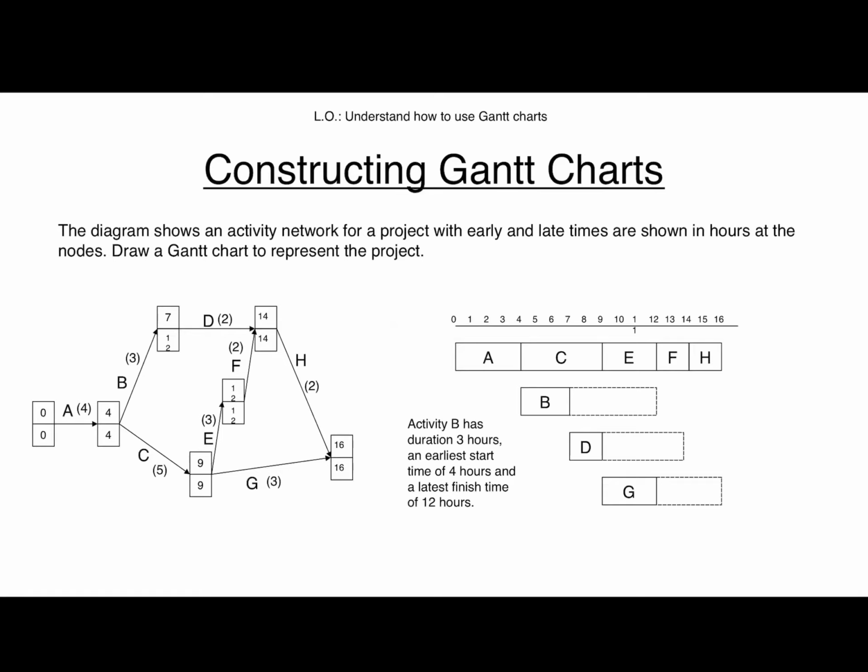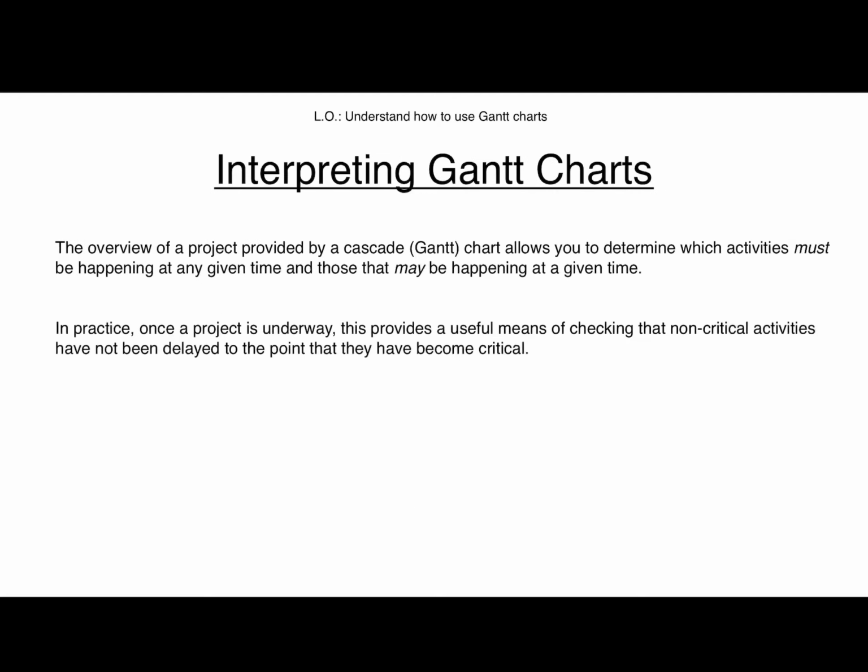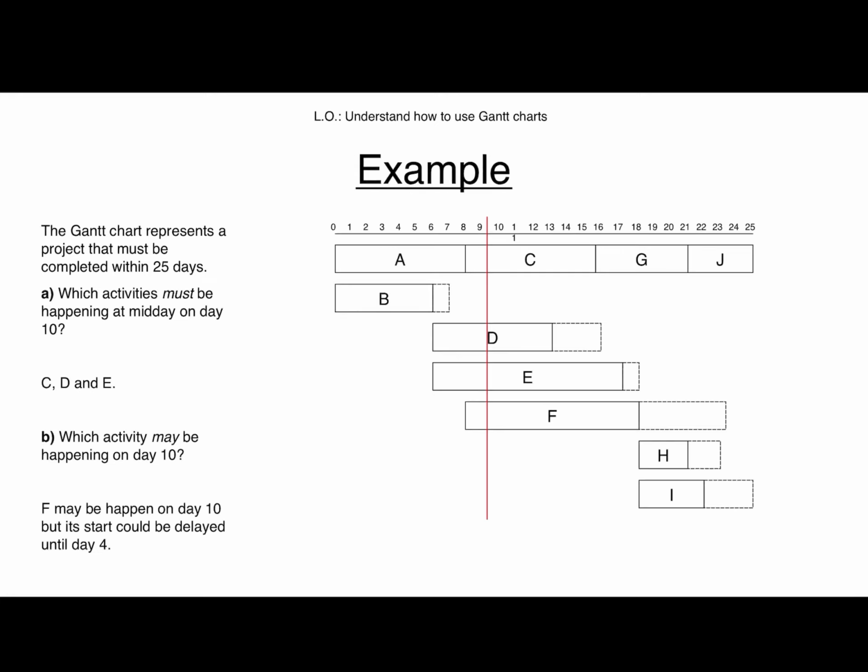So you can use this diagram to figure out how many people you may need on the project. Okay, in practice, it may not be feasible to ask one person to work 16 hours non-stop, but it will give you an estimate for the minimum number of people that you need to complete the project. You can read that yourselves. You don't need me to read it for you.